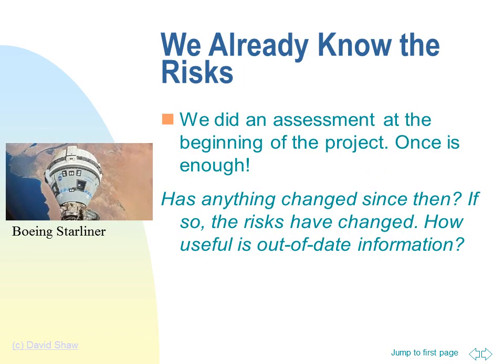You might think you know the risks. As mentioned earlier, sometimes risks are just listed in a proposal or a project plan and then forgotten. But recall the example of the Starliner, where a small risk at the start became a complex compound risk at the end. As the project progresses, the probability and impact of a risk can change. New risks can emerge. Recall that risks arise from dependencies, uncertainty, constraints, and assumptions.